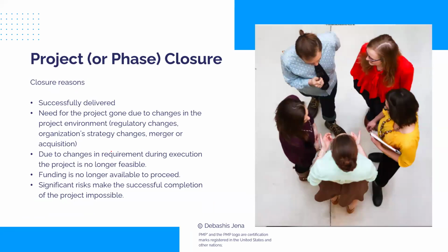So the first thing, typical reasons for closure of a project. These are some, that's anyways common sense. Successfully delivered, that is, everything was done and we closed the project as intended. Second, need for the project is gone. Can this happen? We started off a project, but sometime through, the need is gone. A lot of reasons, say there is a regulatory change making the project redundant, or there is a merger of the company with another one. Because of such reasons, there are cases where a project is no more required. It has to close.